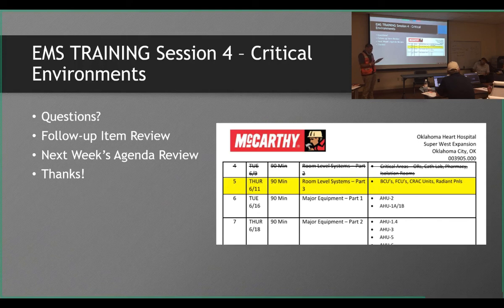The cath lab, we're going to double check those smoke purge dampers, make sure that they're showing correctly, or in the correct position. And then I'll check the door for the control room and make sure whether or not there's a closer on it. We will set up the same report for the cath lab as we do for the ORs, because I think they operate the same. You stepped out at that point, is that right, with that same report?